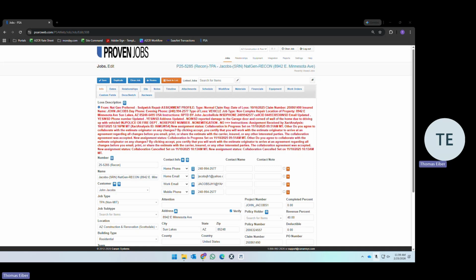Your final walkthrough is a key transition point because it moves to the next stage of requiring the paperwork to finish off the job. And once you have that signed paperwork, that transitions to PCN, at which point you'll be informing operations that the project is completed, no additional work needed. We are ready to leave and get paid, invoice and expense.